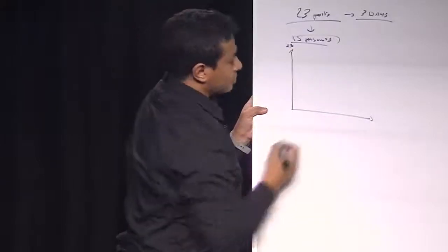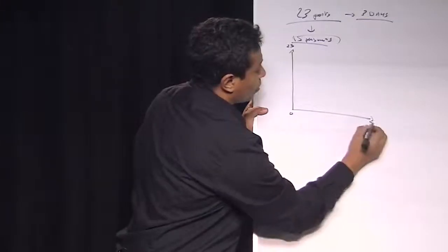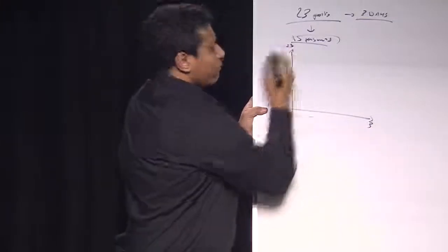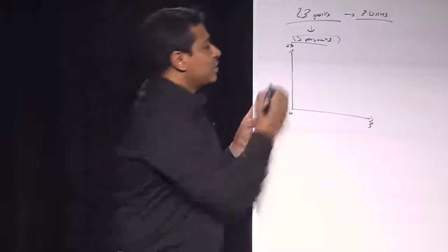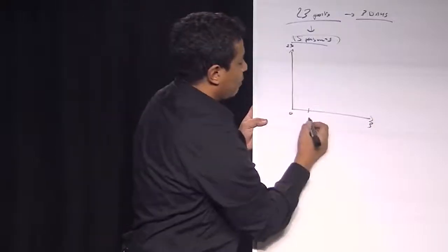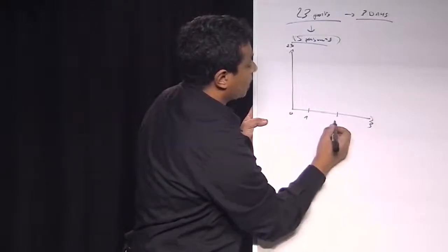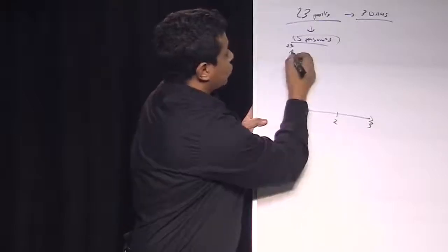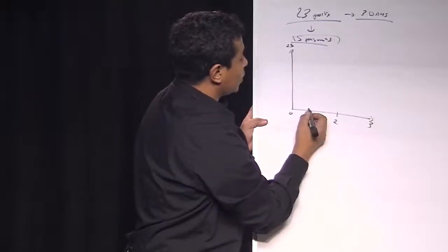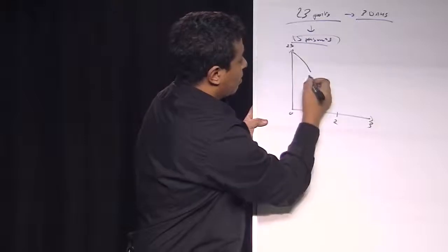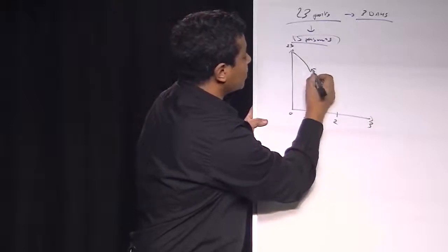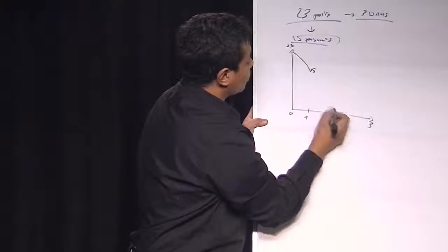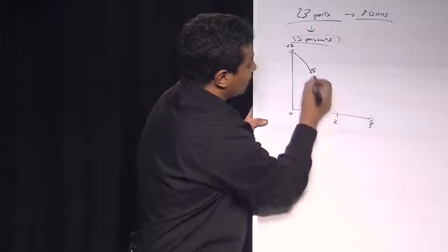So we have the 23 points, from 0 to 3 days. If I do the job correctly, I will get something like that. 23 points, as I did the first job on the first day. Let's say 15 points, and I do the good work correctly on the second day.